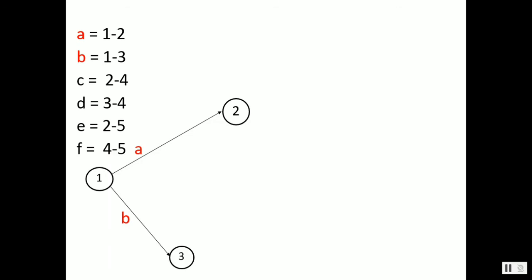Next slide. One by one we move. First we construct the network diagram. For convenience, at the upper left side, we have taken the various activities with their nomenclature and numeric values also. First we construct A and B. Both activities originate out of event 1. So A is 1, 2, B is 1, 3. We are depicting starting from event 1: 1, 2, A; 1, 3, B.